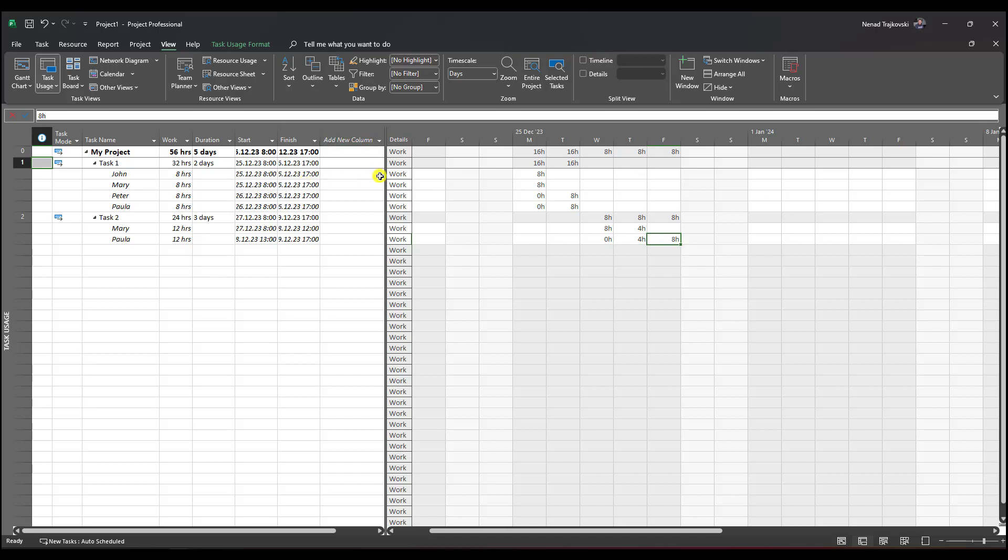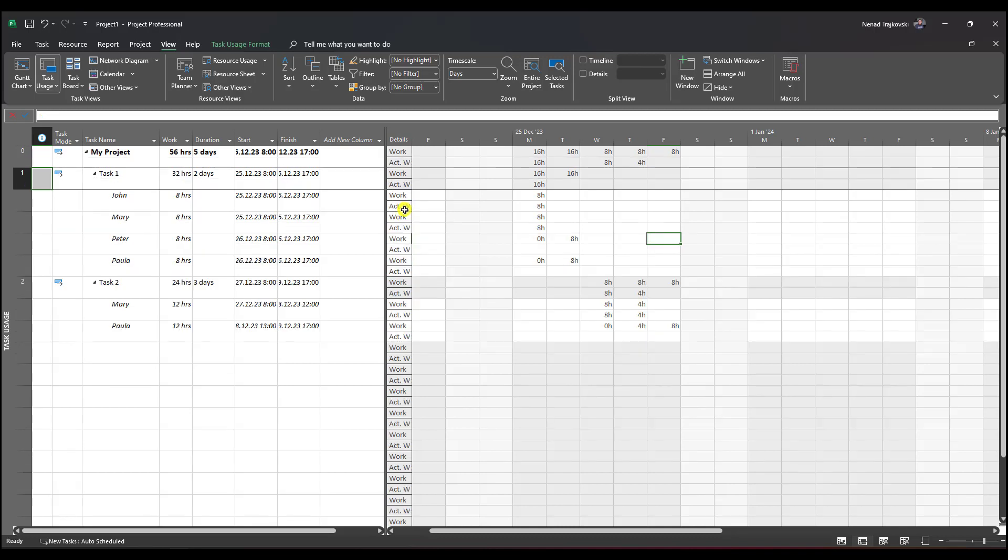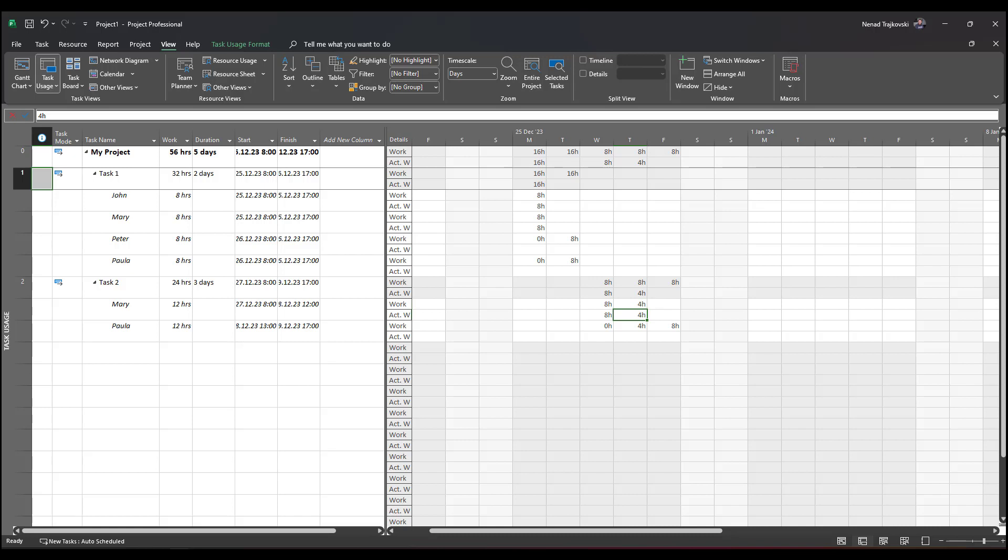Let me show you this. I'll right-click here and say Actual Work. You'll see that on day one, John and Mary fulfilled the job, but on day two, Peter and Paula are going to work. Same here: day one is Mary, day two half is Mary, the second half will be Paula, and the third day will be Paula. That's how you can replace your resources on multiple tasks.